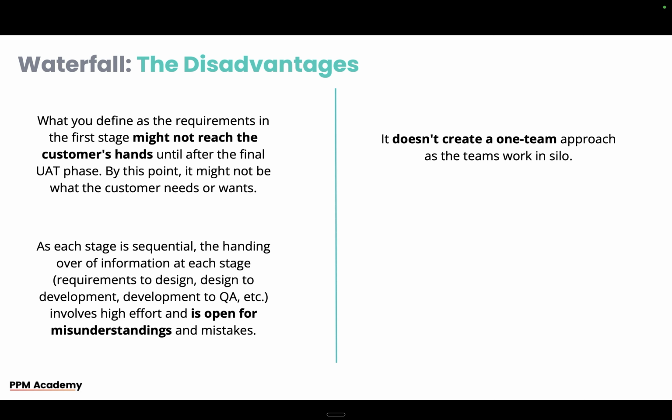It doesn't create a one team approach. Like I mentioned about that one team in the development stage working together, that's just different skills all within the same team. But if you've got a team doing one piece of work and then they completely finish and hand over to another, then there's just no collaboration there. It's essentially just throwing the product over the fence to the next team, and that can cause issues, especially when it goes from development into testing, because testing will say it doesn't do this, it doesn't do that, it says this in the requirements, and the developers will say, well, it does do that because it's doing this.